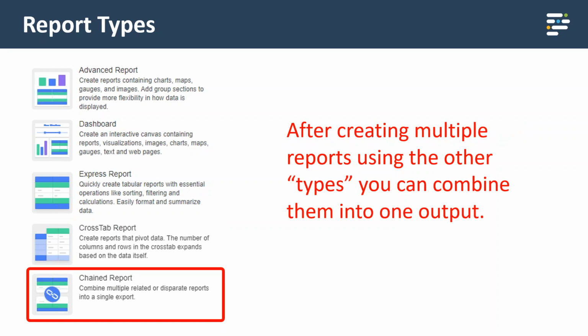And then finally, a change report is used once you have different reports. Maybe I have a report for an archive at the end of my project, where I want to show all of my RFIs and my specifications and my submittals and my drawings and things like that. Instead of printing individual reports or even individual forms, I can just roll all of those things into a common output, and that would be through a change report. In your change report, you can decide what type of output you want, whether that's PDF, Excel, or others, and it'll just join all of your different reports into one.